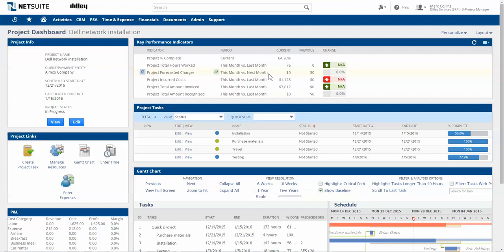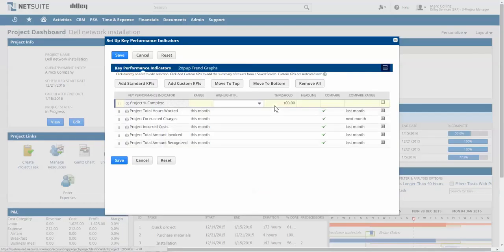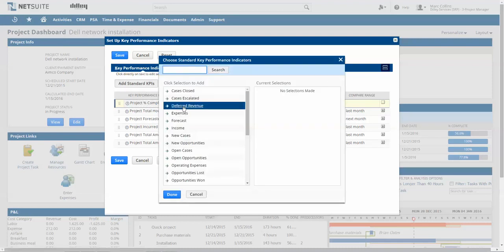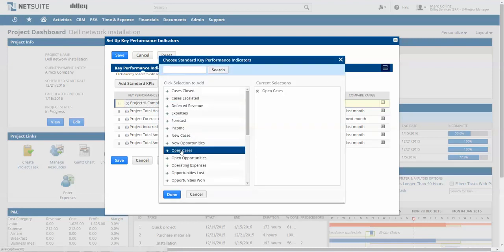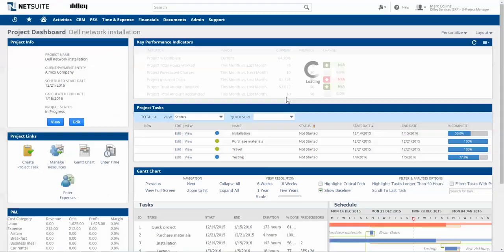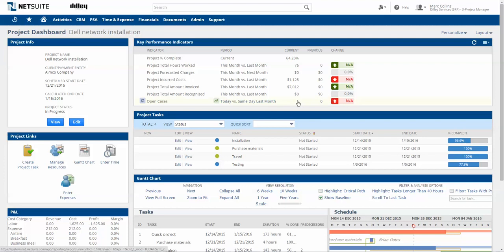For example, I may want to get visibility to any support cases that may be tied directly to this project and have the ability to drill into those. So I can simply select different KPIs, including open cases, add that to my list, and now I have drill-down capability into one or more cases that are linked to this project.